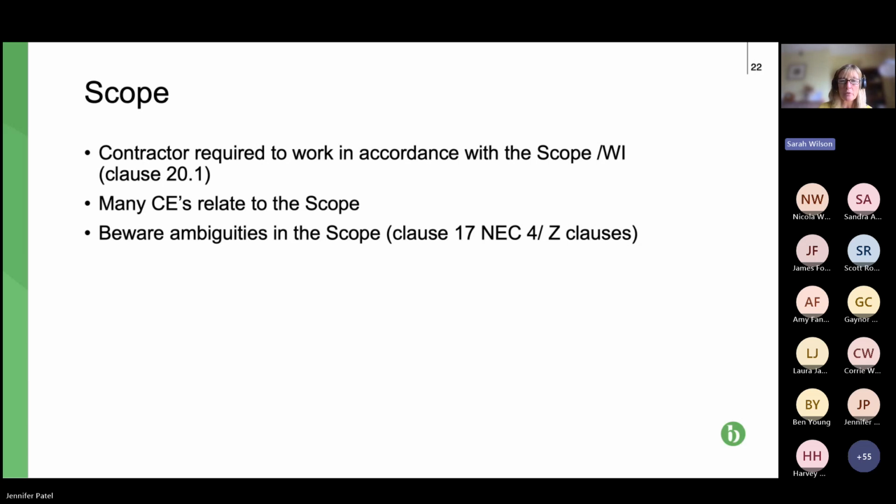So it's far more prescriptive. And you can't have a situation as you get in JCT where the contractor says to the paying party, look, I need you to provide X, which you've said you would provide, I need it 2 weeks today, and then it's not provided. A lot of it needs to be contained in the scope at the time of signing the contract. And again, we'll look at that in more detail in February when we look at the compensation events.